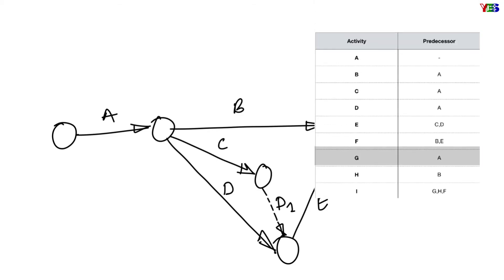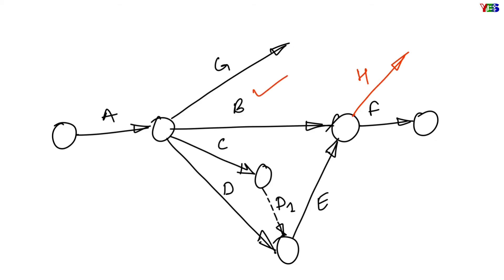Next, here we have one more successor of activity A, that is activity G. In the next row we are having activity H and it is showing B as predecessor of this activity. If we will make activity H after common head event of activity B and E, it will show activity E also as successor of activity H, which is not true. So